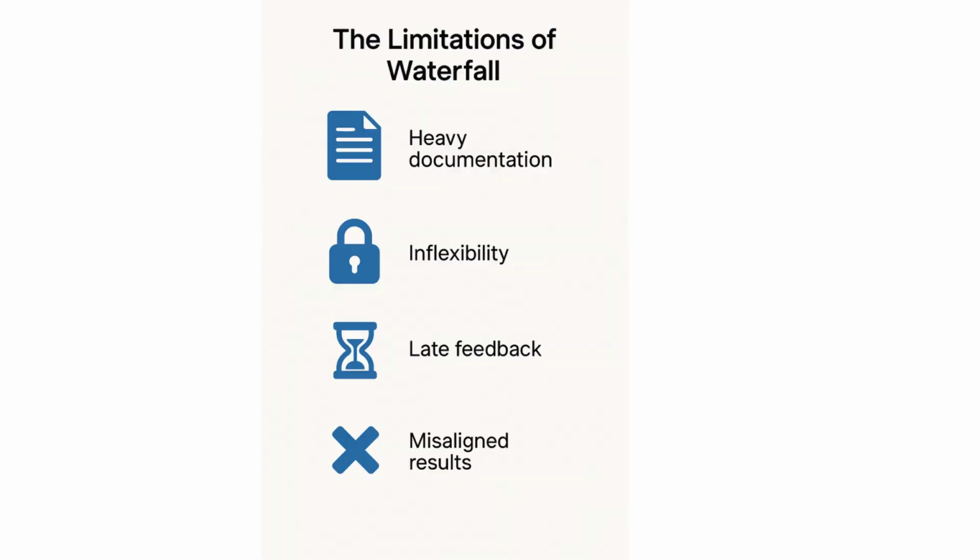The limitations of waterfall. At first, waterfall looks neat and organized, but in practice, it creates serious problems. Inflexibility. Once you start, it's very hard to go back and change something. Heavy documentation. Teams spend months writing requirements that often become outdated before coding even begins. Late feedback. Customers only see the product at the very end, when it's too late to fix major issues.